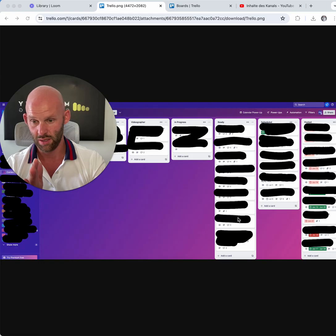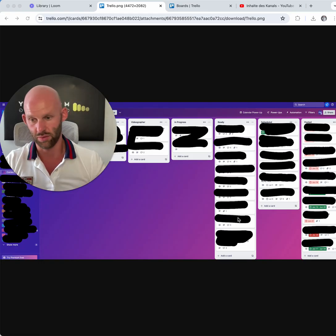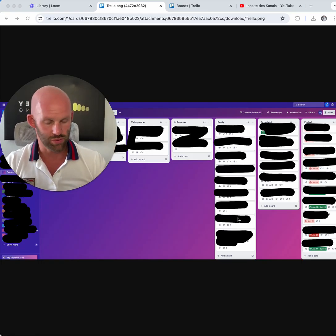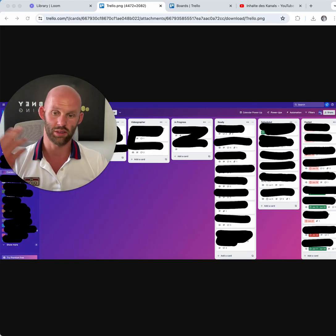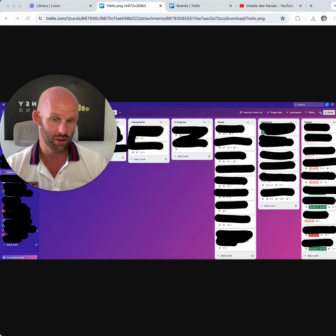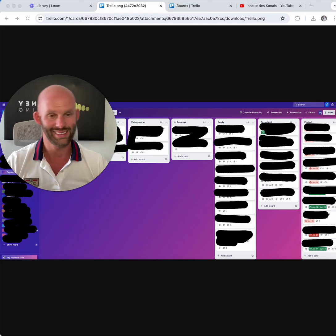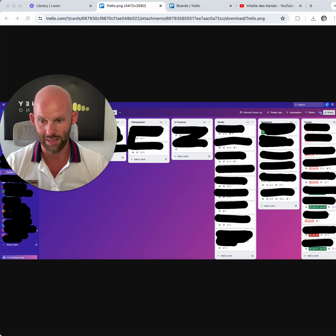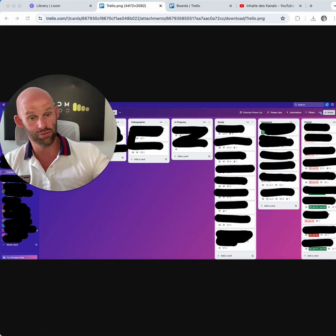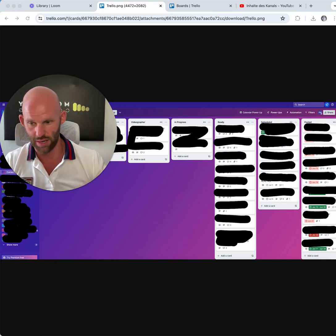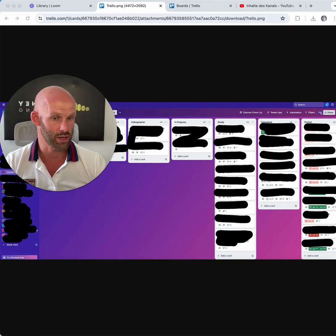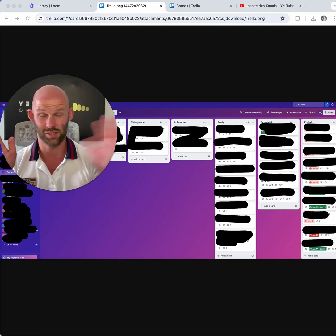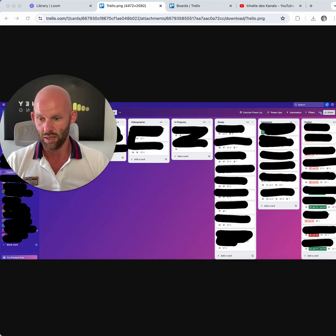Move cards across lists or across the board as bugs are resolved or being resolved. For a Kanban workflow, customize your board to follow a Kanban process with stages like Backlog, Analysis, Development, Testing, and Deployment — which we really know from our daily business. Cards move from left to right as work progresses. You can use Trello Power-Ups for additional features like calendar view or any kind of integration.